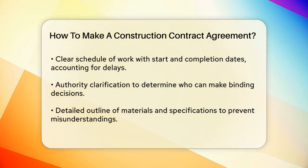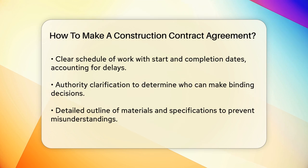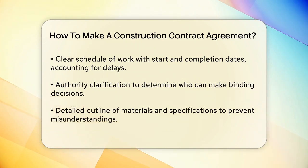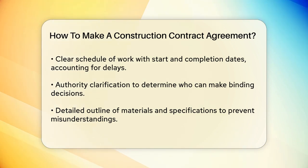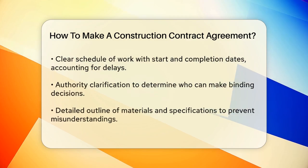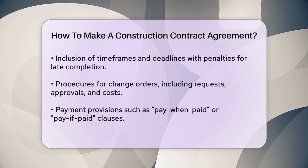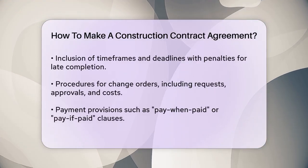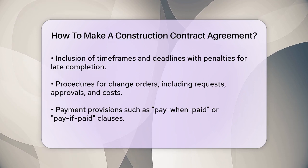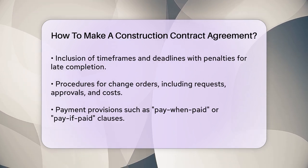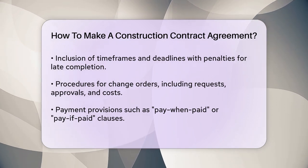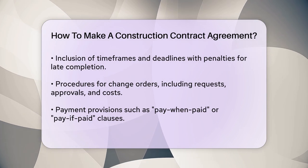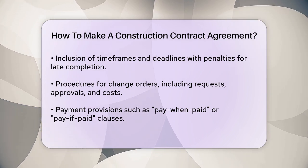Authority is another key aspect. With many people involved in a construction project, it's important to specify who has the authority to make legally binding decisions. This can save a lot of confusion and headaches down the line. Materials and their specifications should be outlined in the contract as well. If there are specific materials that the homeowner or builder insists on using, these need to be detailed in the contract to avoid any misunderstandings.